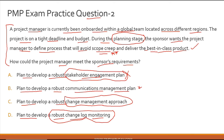Option D: plan to develop a robust change log monitoring. This could also be an option — monitoring a change log tracks how changes move from proposal to acceptance or rejection and then implementation. After this first pass, we've eliminated option A but are left with B, C, and D. Option B is incorrect because the relationship between communications management and scope creep is secondary or tertiary, not a direct primary relationship.